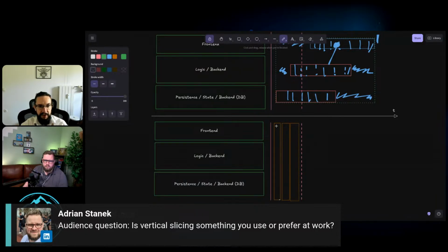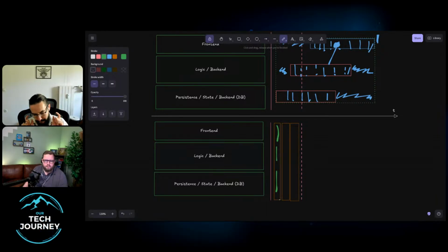Now, ideally, it's the front-end person doing the front-end work, the back-end person doing the back-end work, and the DB person doing the DB work. Or maybe the back-end person is doing both, or you have a full-stack engineer, but you need 2 of them because there's some special logic going on. What is most important is to focus on, let's say, the WIP limit, the time limit of, hey, I just want to roll out something. Like, I don't want to develop the backend faster than I'm developing the front end. It's about pacing. It's not so much about feature completeness.